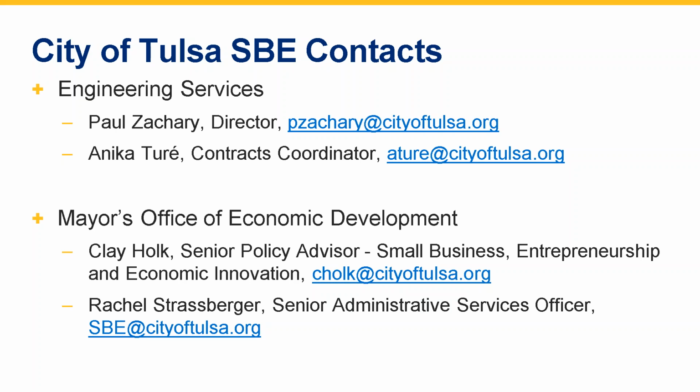The issue with the bid or the instructions to bidders, the contractors are kind of on their own, and then once they submit it, that can't change, if that makes sense. Bid day, once our documents are submitted, and maybe this just needs to be a point, once a bid is submitted, the prime contractor cannot change, or once he sees that he has submitted a low bid, then go back and chase and go get the SBEs. All these SBE documents and all those declarations of their use, they cannot be modified once they submit.